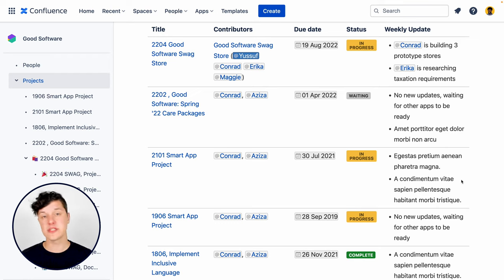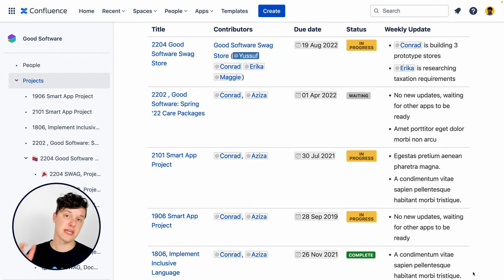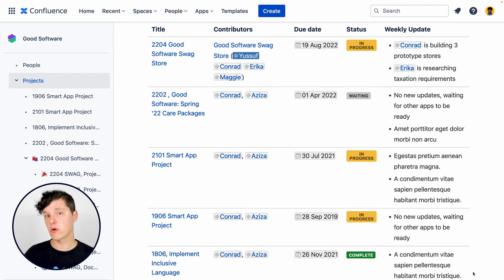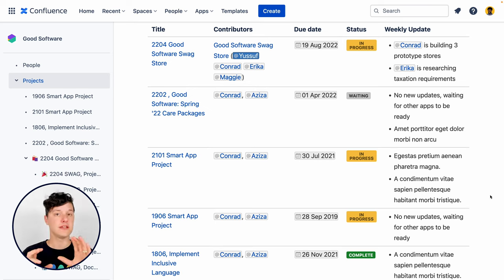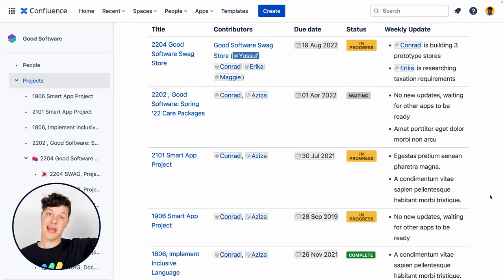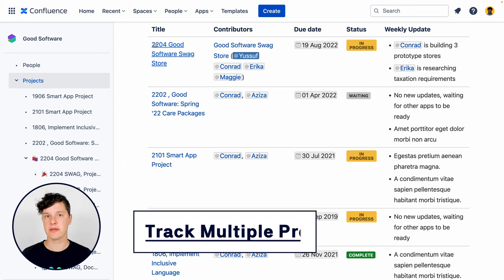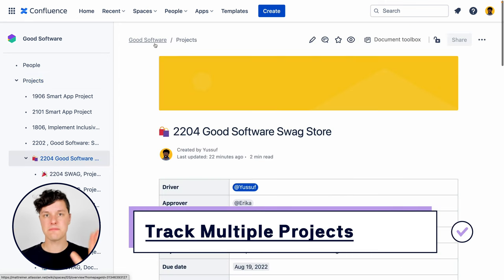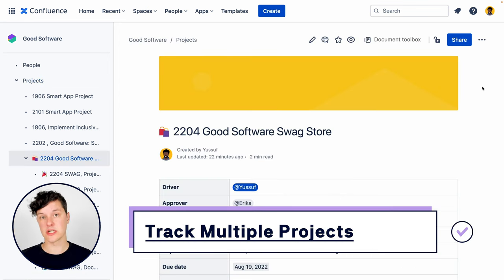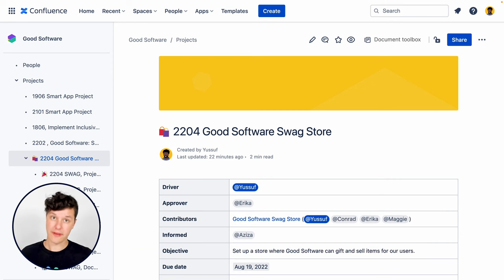This is done using some clever little macros called the page properties and the page properties report macros. They do some really cool stuff to pull the information out of each project and put it on that big project overview page, so you, as the PM, have to do very little work to keep things up to date so your stakeholders know what's going on.